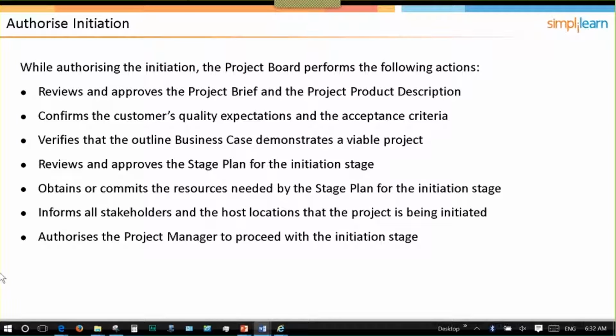Its composition. So for example, when we looked at perhaps reducing the incidence of a specific disease in an area, we could do it through education. We could do it through providing medications. We could do it through improving health. So what components of that are making up the product of reducing and improving the health of people? Big difference in the scope, right, as to whether I'm just educating the healthcare workers or I'm educating the general population and providing goods that will help them, like mosquito nets, inoculations, better quality food, perhaps drinking water. Very different cost and scope to the project. So that's why we have to list the composition.